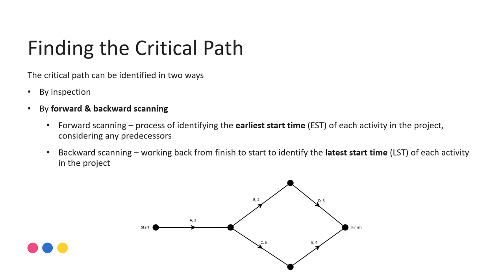Forward scanning is a process of identifying the earliest time that each activity could start in the project, taking into consideration all of the predecessors. Backward scanning is then a way of working from the finish back to the start and identifying the latest time that each activity could commence. Where the earliest time and the latest time are equal to each other, that means we have no float, no slack time for that activity, and therefore it's a critical activity.